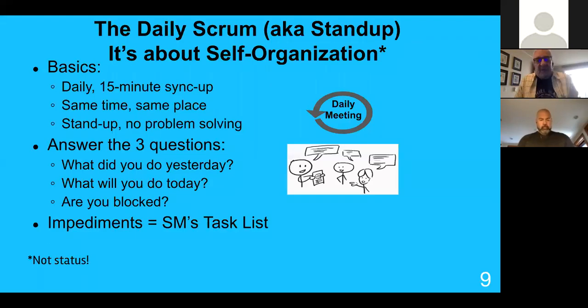And one of the benefits of that is that it gives the team a chance to do something called story splitting, which is another thing we won't have a chance to go into today. Story splitting is the idea that you can pick and choose, maybe not how big on an absolute scale a story is, but you can always make stories smaller by splitting them, and there are vanishingly few cases where you can't once you get the art of how to do that. So the way to avoid the situation you're talking about, I think it was Dawn, is working with smaller and smaller stories.